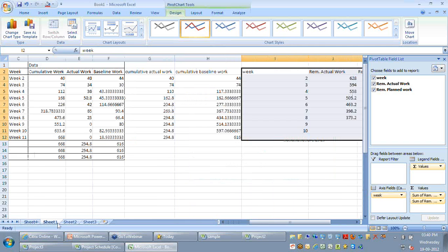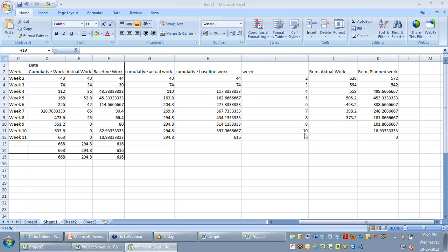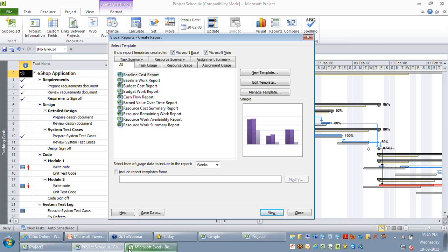How do I show dependency on a previous task or a dependency of a subtask? Okay, that is pretty much easy. I'm just going to go back to my project. Let's say I have two tasks here, prepare, and another task called review. By default, there are no dependencies between these two activities. If you want to set the dependencies, make use of the predecessor column, where you can key in that the review should be starting only after prepare is completed.